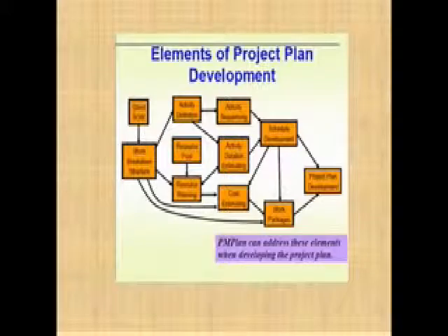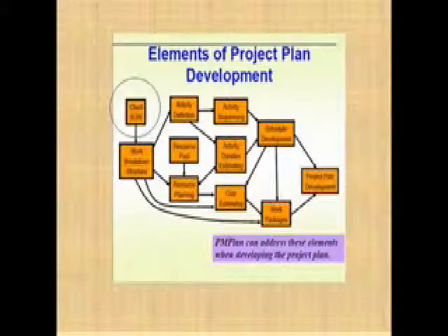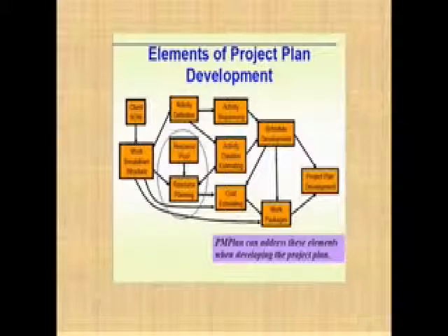Now, in this slide, it is shown that the plan development starts with a statement of work. Okay, and this will lead to a work breakdown structure from which all activities will be defined and from which the resources will have to be identified. Okay.